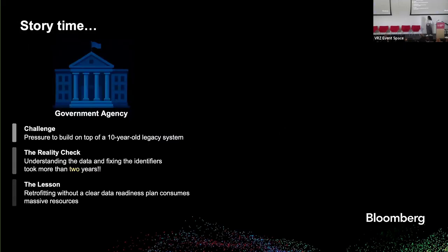But here's my story, specifically when you're thinking about building on top of legacy systems. We were working with this government agency, and there was so much pressure on us to build on their legacy system. It was only a 10-year-old system, so I thought, okay, it's not bad, it's just 10 years old. You will not believe it, but it literally took us 2 years just to understand what data is in their system and figure out the identifiers. And we were like, oh my God. So lesson learned: trying to retrofit without a clear data readiness plan is not a good idea. Let's just not do that.